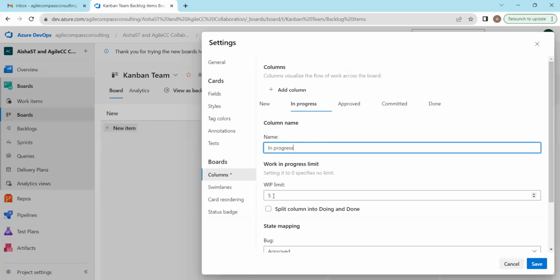I would always want to set my WIP limit based on the number of team members that I have, right? Again, WIP limits is never constant. You can always work with your team to revise your WIP limit so that it works for you guys, right? So I will always mostly go with the number of team members I have, but times 2 + 1, right? And then I start to streamline it, especially when it's a new team. I start to streamline it based on how we're getting tickets.